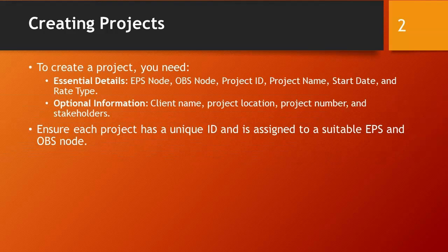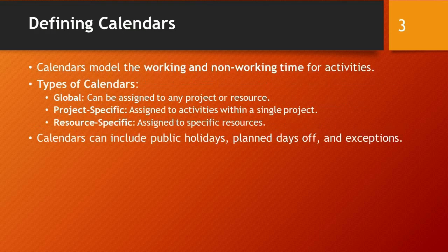To create a project, you need essential details such as EPS node, OBS node, project ID, project name, start date, and rate type. Optional information includes client name, project location, project number, and stakeholders. Ensure each project has a unique ID and is assigned to a suitable EPS and OBS node.